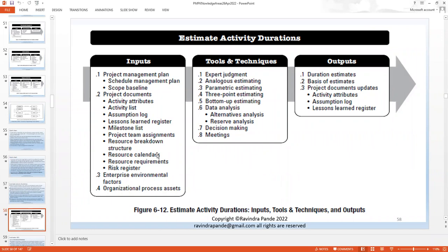That's how I normally estimate activity duration and schedule this task for a given number of days with a given number of resources. If there are any risks like environment leaks, tornado, snow, heat wave, all such challenges, I'll try to analyze them before I start this task. So that in case I need anything extra in terms of resources, it can be something like a snowmobile. It can be something like a special understanding of the weather, or of any challenges in transport and all those things. I'll make sure those things are addressed before we start this task.